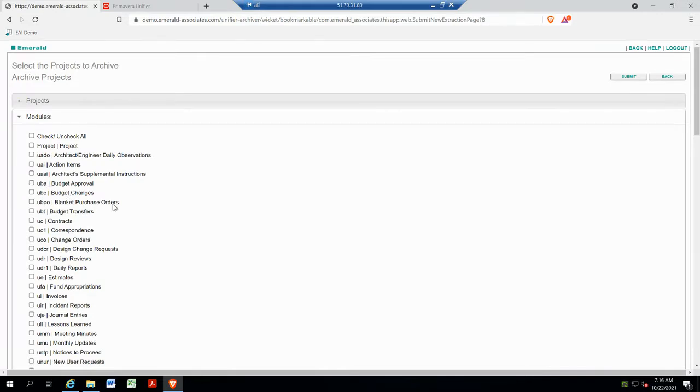So blanket purchase orders are those procurement items that I mentioned that you would often do at the corporate level. Okay, typically long lead items that you might want to buy in advance, even prior to funding for the project, possibly, or full funding for the project.